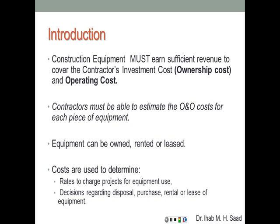Costs are used to determine rates to charge projects for equipment use, which will be part of our bid. We need to make decisions regarding disposal, purchase, rental, or lease of equipment. At certain points, we must determine whether it's better to purchase and depreciate the equipment over the project, rent it short-term, or lease it for a medium term — not as long as owning, and not as short as renting.